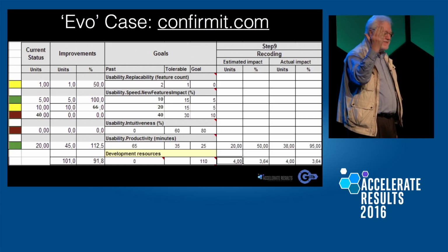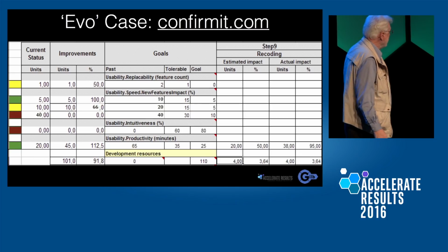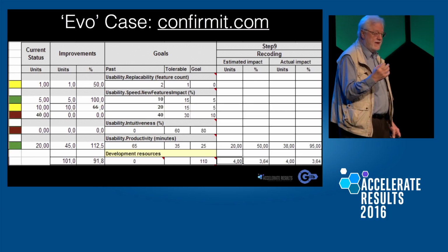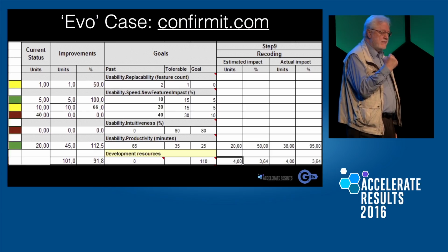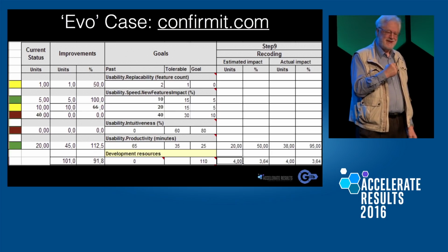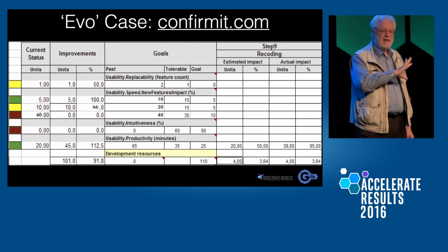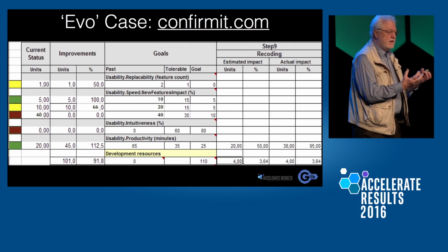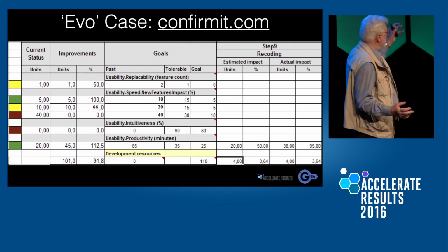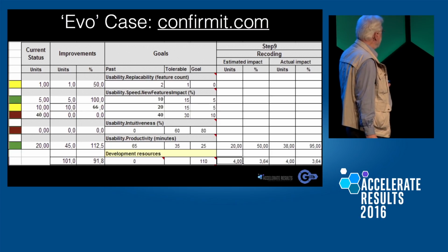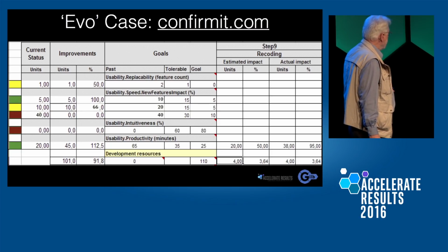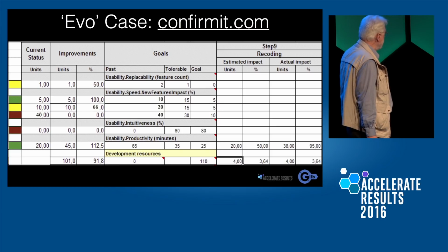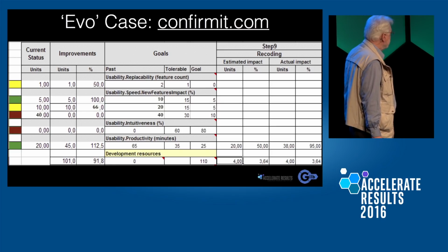Okay, we're tracking the value for money and time, and it's quite clear that they have 8% of the value to deliver, but they've got 25% of their time to do it. So what happens? They always deliver all of their values by redeploying their forces dynamically to the weak points. They don't waste their time on things that are already achieved. At the beginning of week 9, they took a look down here and said it was at 0. And they said, let's attack that one.